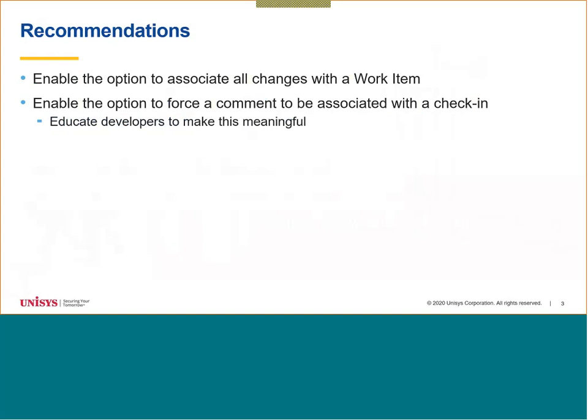That means that in 6 months' time, when you think, who wrote that bit of code and why did they do it? It's there. If you just let users check in changes without a work item, you don't really know why they made the change. To me, the simple rule is no work item, no work. A developer must have a work item to work against.